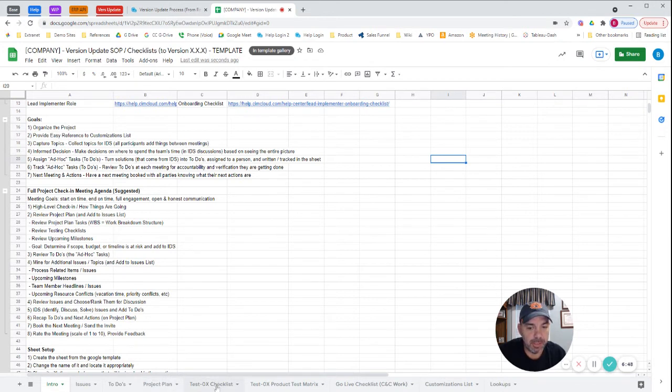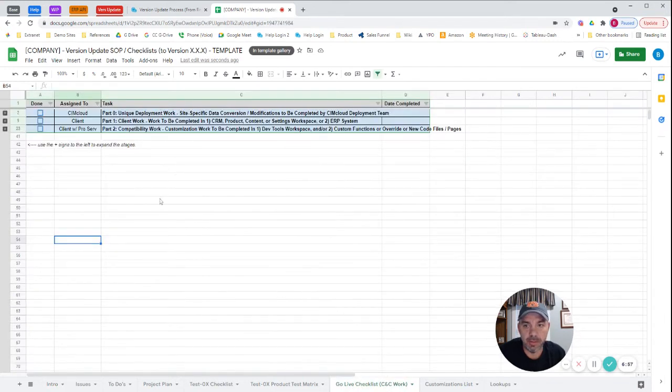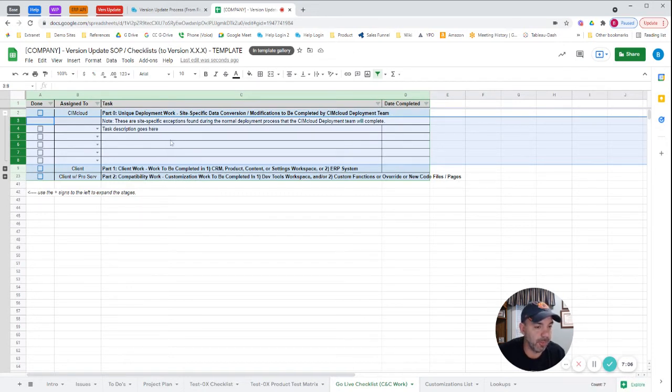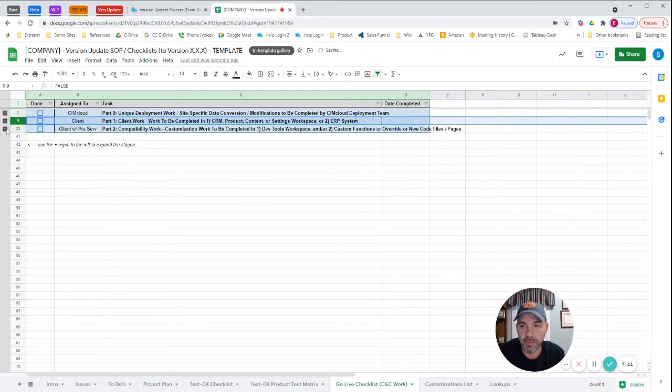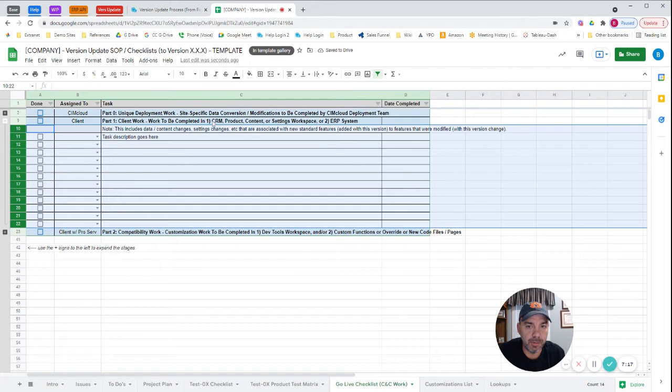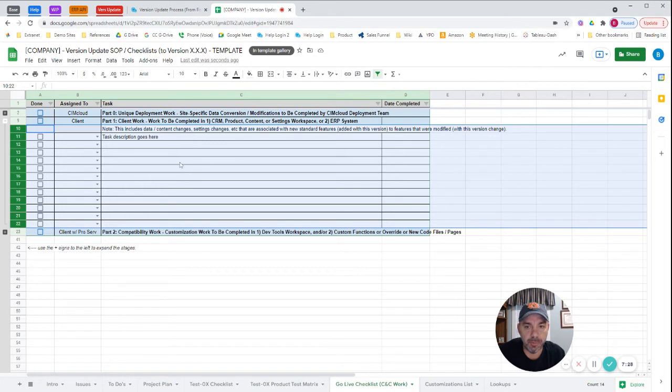The artifacts that are key here are there's two testing checklists and then the go-live checklist. I've already referenced the go-live checklist. This is the checklist that you're gradually building. One notable is we have an option to put stuff in here for SimCloud. If there's weird exceptions or things that are coming up related to the version update that are identified, SimCloud can drop tasks in here. And then effectively, this client work is up to you as the client, your responsibility. This is work that needs to be done in CRM, product content, or settings workspace, or in your ERP system to make the new version update work and have continuous operation with your site.